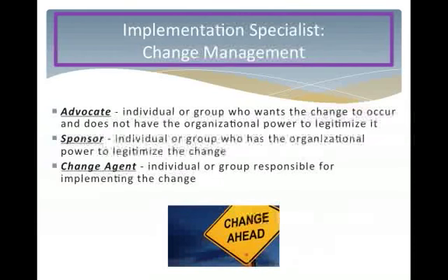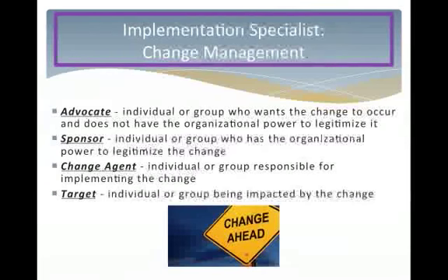Change agents are the implementation team members who help bring change along to all staff. The employees impacted by the change are called targets. It is certain that many employees will play several roles in the change process. If you think about it, the implementation team members are not only change agents, but are often targets of the change, and they can serve as sponsors to an employee who they supervise. It can get a bit overwhelming, which is why having a trusted team and solid executive level sponsorship is so important. Expectations.